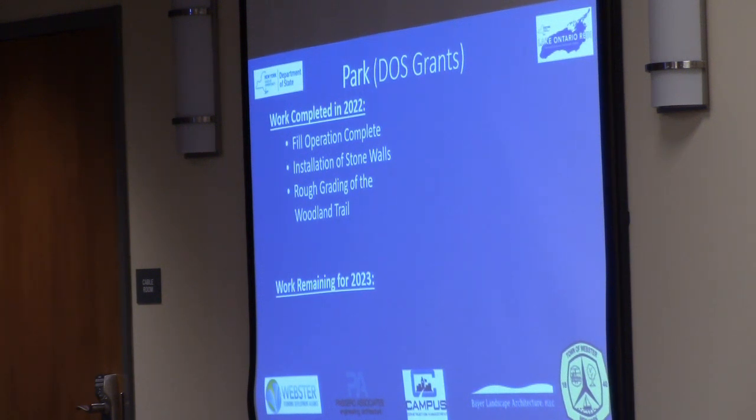Rough grading of the woodland trail, which resides on the north side of the project. It's a walkway along the lake. The shade structure foundations are in, as well as the flat work, the concrete work around it. The restroom facility, utilities, as well as the foundation work there is complete. It's waiting until next year to get the actual building installed on top of it.